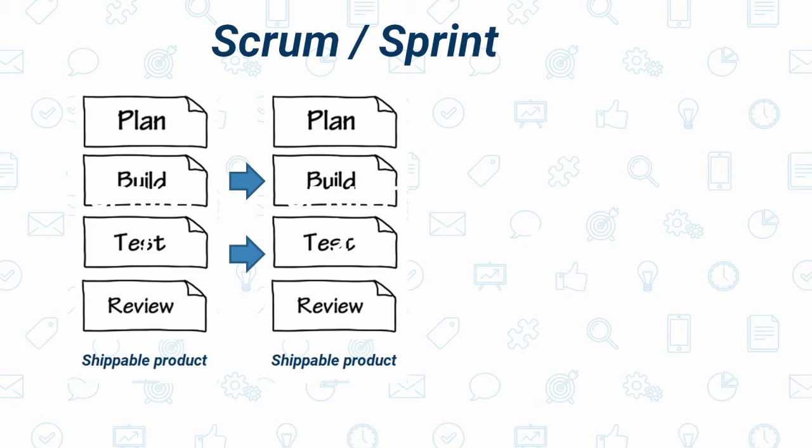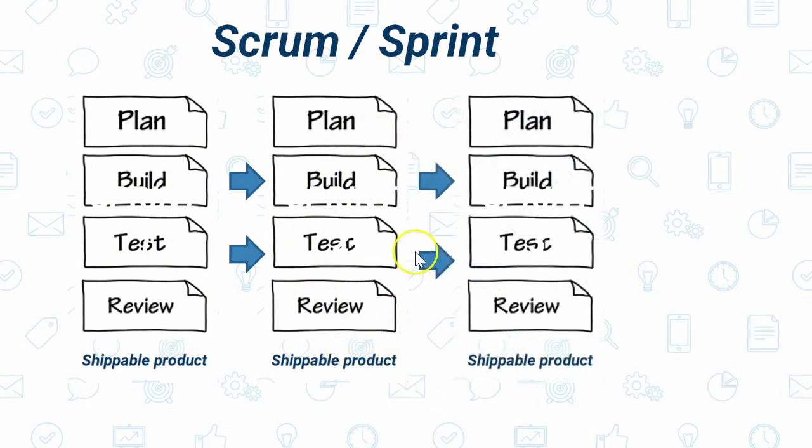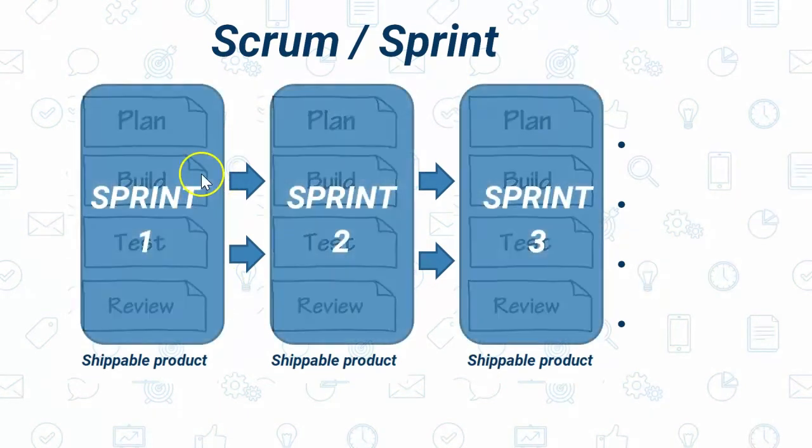So instead of developing the whole of the software, build small parts of the software which can be shipped to the customer. Build the software in an incremental model. Build a small part, then on top of that build another small part, so that in each phase, which we call a sprint, the outcome of that sprint is shippable to the client. Similarly, when the second sprint completes, work on the next item and so on. This one activity, this one phase, is known as a sprint.